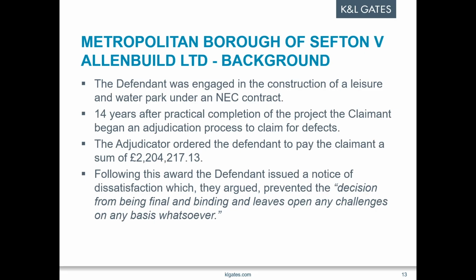There was also another case, Prater and John Sisk, which found that a notice of dissatisfaction was required both for challenges to validity or enforceability of an adjudicator's decision, as well as challenges to the substantive merits of the decision.